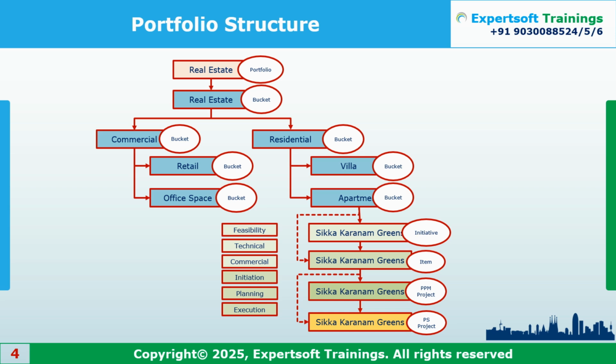Wherever I want, I will just copy that, so my entire structure and entire financial planning, everything will get copied. Just assume here I started some item 001 as my template. Under that I have done all sorts of planning. Now when I copy this one, the system will create another number automatically. That will be E002. That E002 also has this financial planning and everything. And you can change whatever you want as per your business requirement or project requirement.